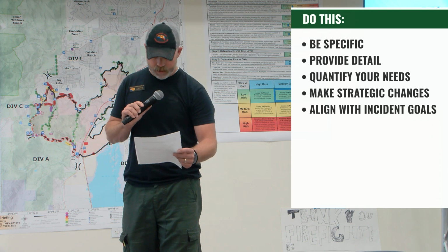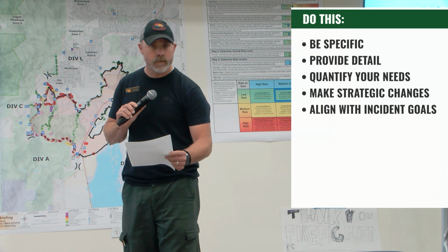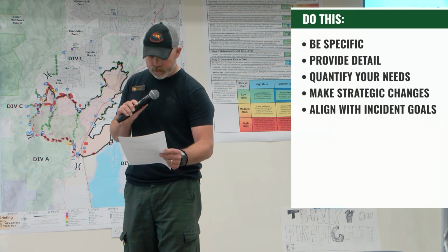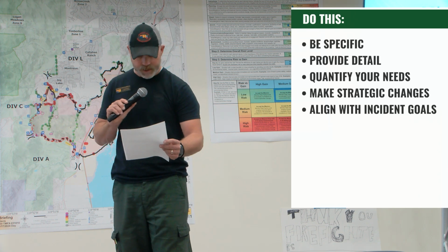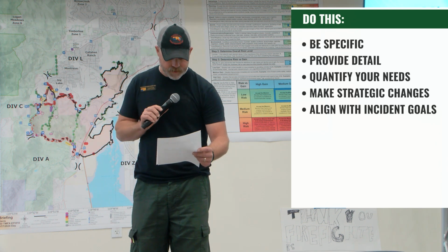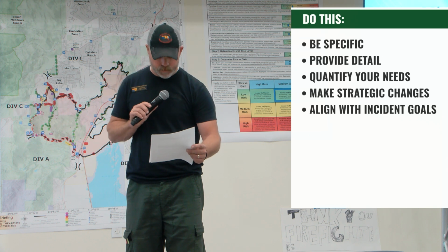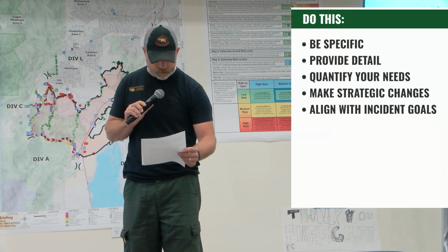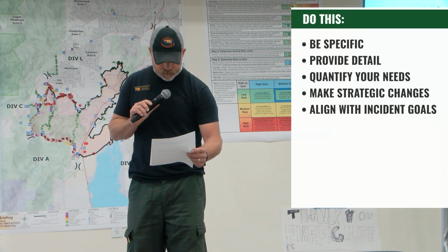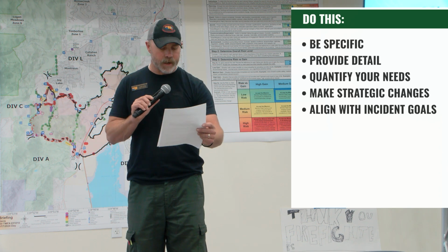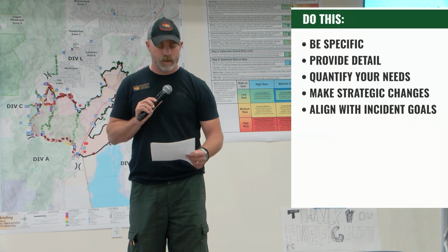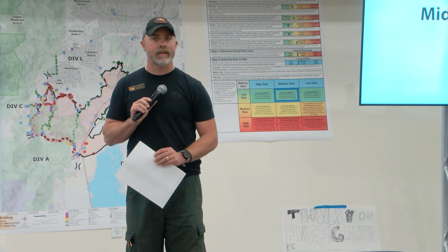Completing the fire line and mop-up in these areas is critical to securing the values at risk. Until this is complete, we will ensure we are ready to shift to point protection if required. After today, we recommend shifting the 2 Type 2 crews to Division Bravo to ensure they can complete their line prior to our firing operation to increase the chances of a successful burnout and the protection of Ryderville. Next, you'll see a midday report on an ineffective example.